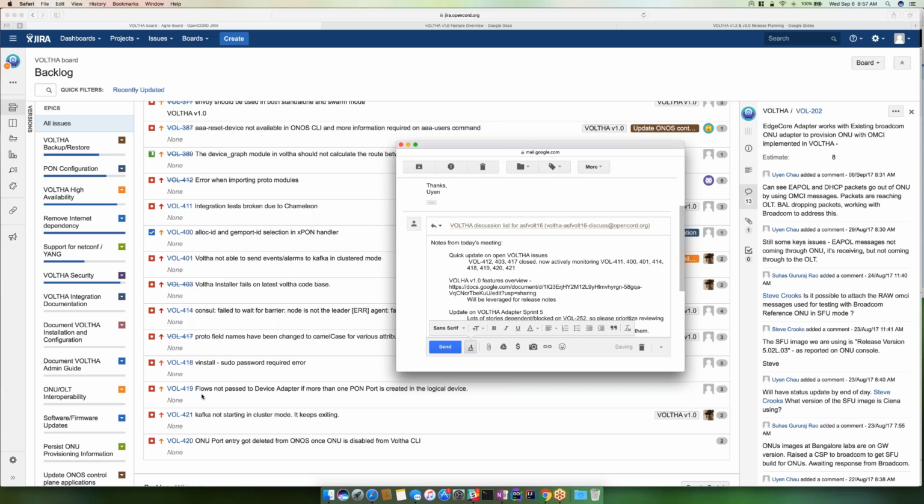I mean, I think that's hard to judge, right? Unless we've got a list of tests that people, all right, back up. So normally when you're going through this sort of testing, there's an integration test team that has a list of integration tasks that they're working their way through. And which is what I assumed each vendor was doing. Each vendor may. We don't have a master list. We don't know. I think there's still some assumptions that each vendor's making that may not be a universal assumption.